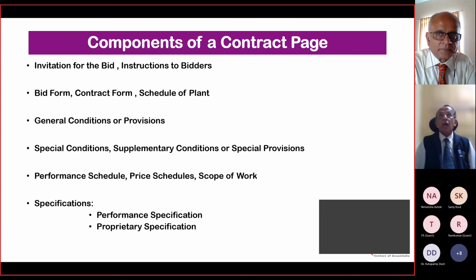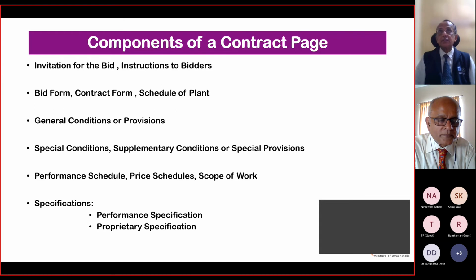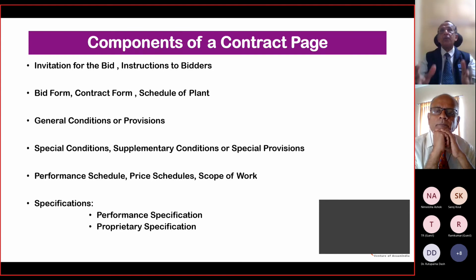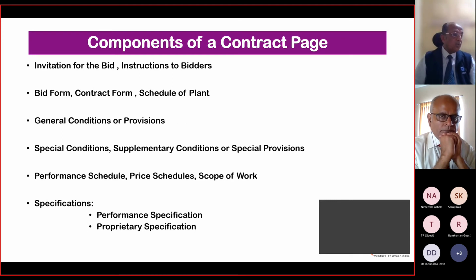Thank you, Shyam. To add one more point to what Shyam has said, in the absolvency certification, they have to certify that the technology being used in the material which is procured belongs to them. It has not been taken from any place, nor have they violated any patent rights. They are the sole proprietors and they absolve us from any liability whatsoever which may come on the way. That's number one. It is also called the infringement of title. They are the sole owners of this technology and we are absolved of all liabilities.